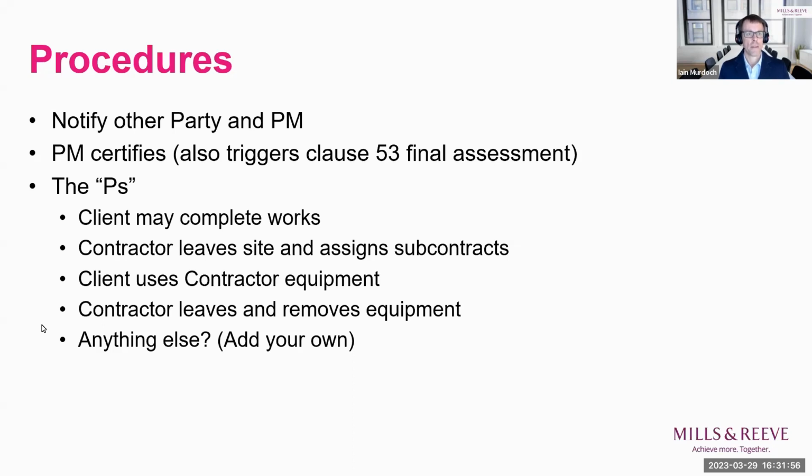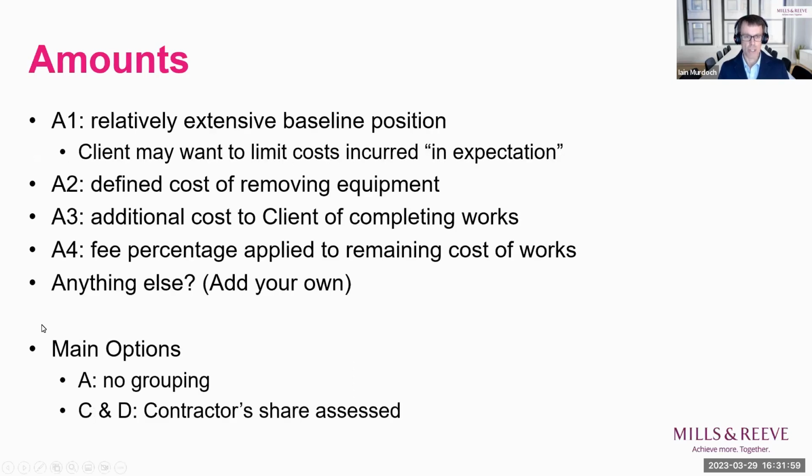So having mentioned the reasons, having mentioned the procedures, let's move on to amounts. And I think it's fair to say that the NEC has a relatively extensive baseline position under A1, that sums will be due to the contractor under that default position. And in particular, I think it's fair to say that on some of the sorts of projects that the NEC ECC is used for, clients may want to limit the costs that can be incurred under A1 in expectation of completing the whole of the works.